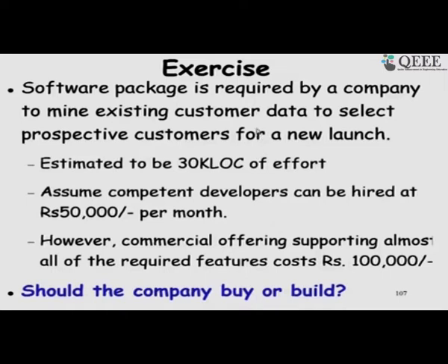So, first we have to consider what is the mode of the software. Is it organic, semi detached or embedded? As we discussed, the same software can become semi detached or organic or embedded depending on the experience of the development team.